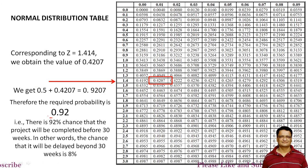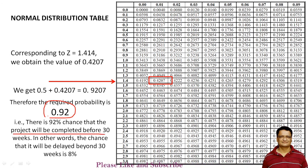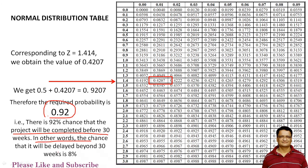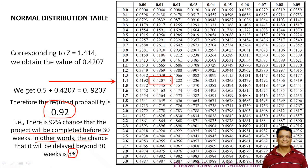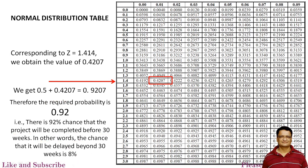So 0.92 is the probability that the project will be completed within 30 weeks. In other words, there is an 8% chance — that is, 100 minus 92 — that it will be delayed beyond 30 weeks. In this way, we can compute the probability of completing the project within the stipulated time.